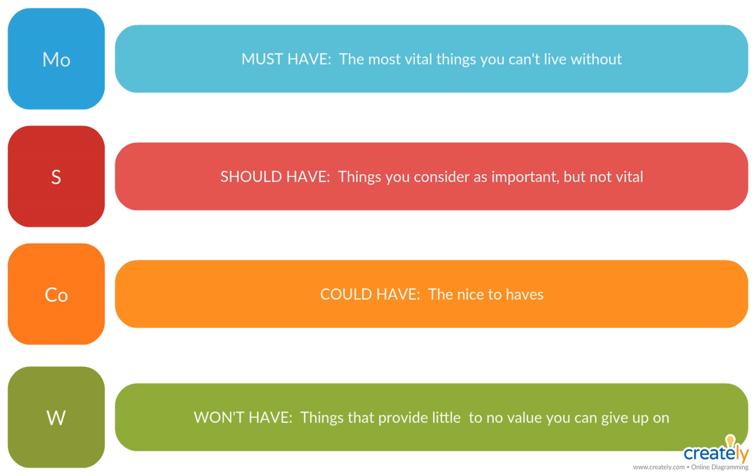But as we go through the project, we're working off that initial alignment of expectations, and we're very protective about making sure both we and the customer are in agreement on what gets into the must-have category for things that get added to the project. In some cases, you learn as you go. A lot of times, new items come into the backlog that a product owner decides actually have more value to the business than some of the original things.